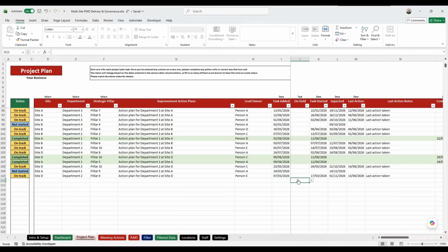And then what the spreadsheet does is, if you get to that point and stop, the spreadsheet then goes, okay, today's date. It then counts down a certain number of days before it changes the status from on track to overdue. Because you can't just say, we don't want to have something on track the whole time. You want to be able to enter a start date, but we want the status to change if this isn't touched over a while.